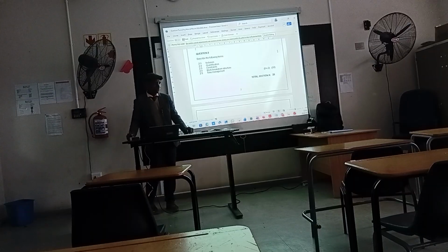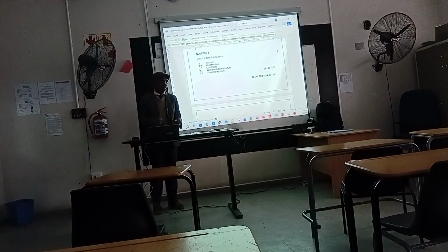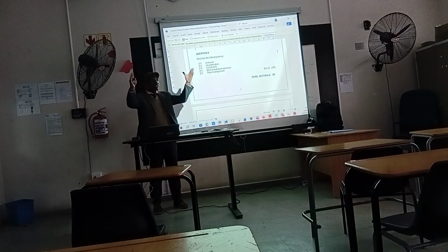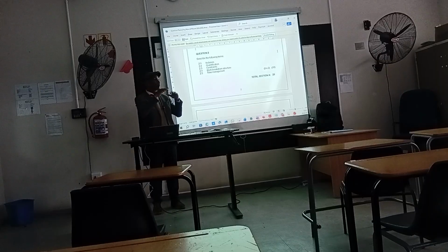So how will you be able to derive your work breakdown structure from your project? What you do is take the project holistically as it is. Then you first of all start by breaking it down into main tasks, right? From main tasks you have some tasks with subtasks, and so on.